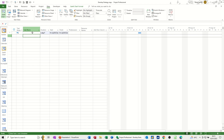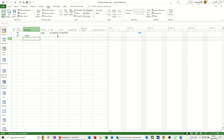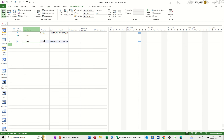What is the difference between manual and the auto scheduling option? If I do a task set to manual and type Task A, you can see it just does the actual task name — nothing appears in the other columns. But if I leave this one on the default, Task B automatically puts in an estimated duration, a start and finish date based on today's date or whatever date the project is. This project file I've opened is an old one — July 22nd 2022 — so I'm going to change the start date. This is a thing you need to do if you're not going to start a project on the day you open the file.